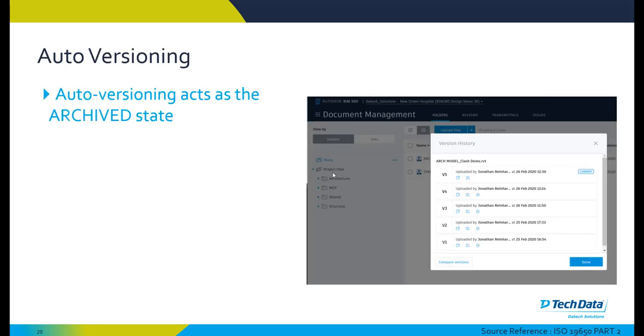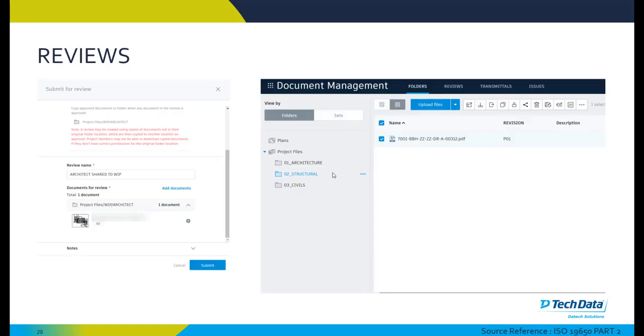Auto versioning acts as the archived state of a particular project. Every time a file gets updated and retains the same name, it's automatically kept as a version. Therefore, all of our archived information is retained automatically within the BIM 360 environment. We can roll back to those particular archived versions or auto versioned versions at any point within a project and even compare them from V1 to V5, for example, as seen on screen here.